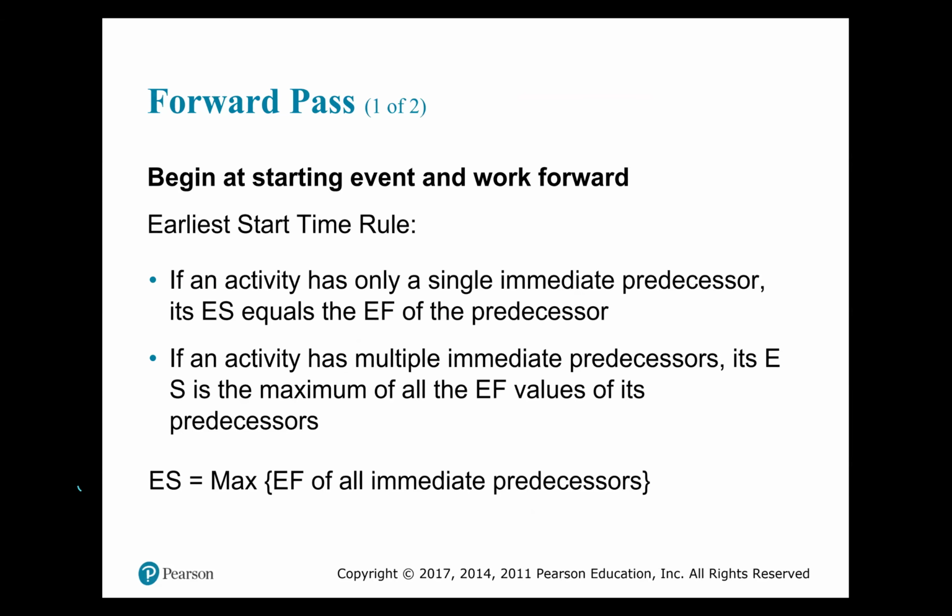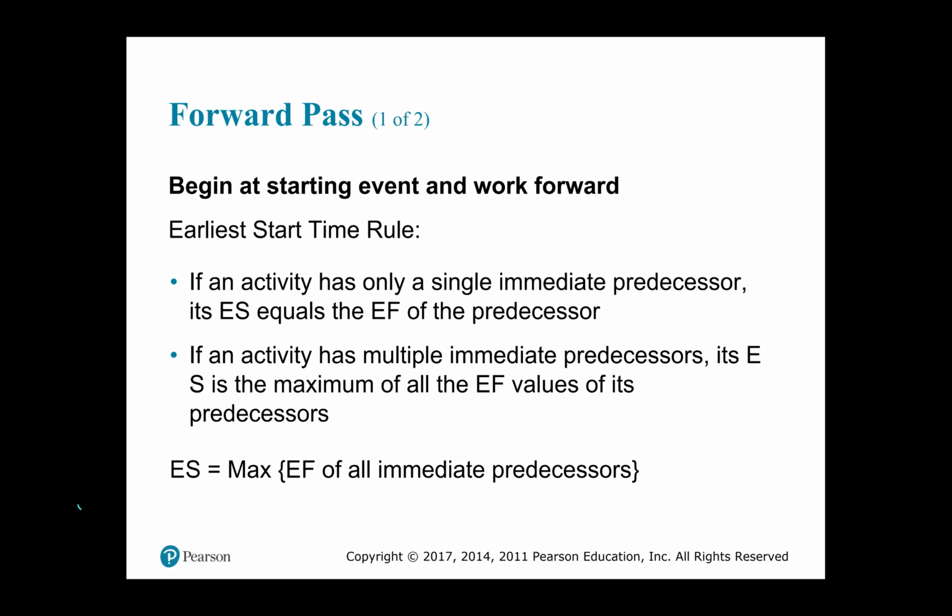So for the earliest start time rule, if an activity has only a single immediate predecessor, its early start is equal to the early finish of the predecessor.